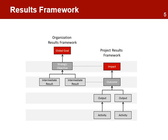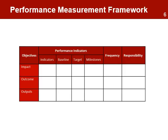These indicators are defined in the strategic framework and all projects in organizations align the results framework to these indicators. This ensures that the results obtained at the project level contribute to the results at the organization level. For example, the outcomes of a project framework can be aligned to the intermediate results of the organizational framework. In results-based project management, the logical framework matrix moves up one step further and incorporates some changes that will allow a better structure to manage and monitor the project.